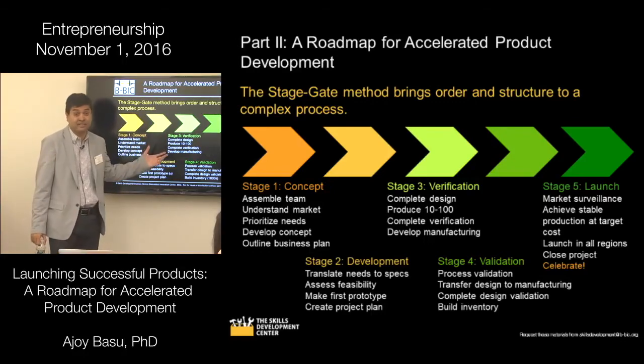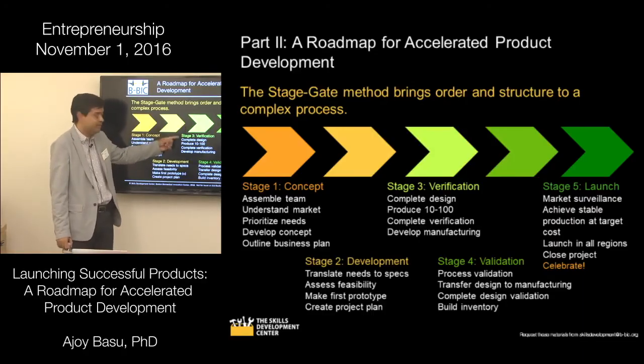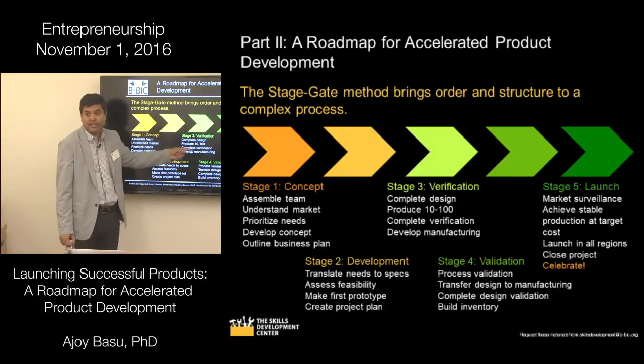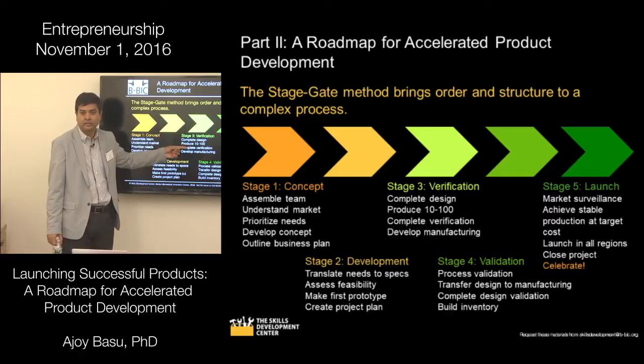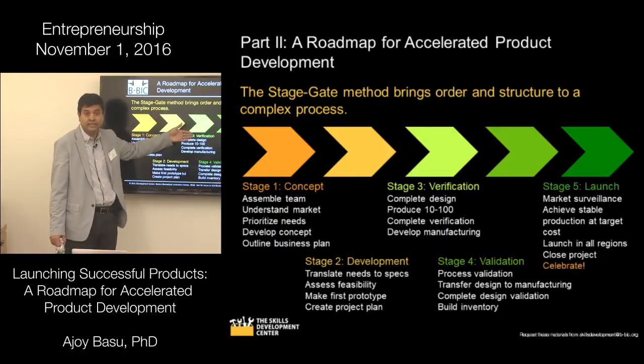I mean, even in businesses, right? Because what happens is we start projects and suddenly we find out that here we cannot manufacture at cost. We need it to be less than $5, but we are coming in at $8. So if you ask for money in these tranches, a project gets killed at any of these gates, if you will.